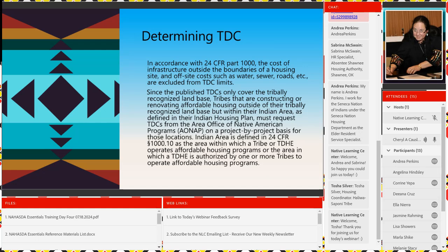Since the published TDC only cover your tribally recognized land base, tribes that are constructing or renovating affordable housing outside of their tribally recognized land base, but within their Indian area as defined in your Indian housing plan, must request TDCs from your area Office of Native American Programs on a project-by-project basis for those locations.